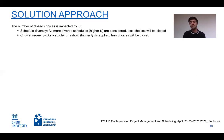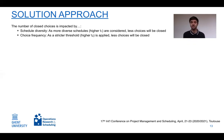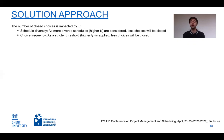The number of closed choices is impacted by both criteria. As we consider more diverse schedules — i.e., a larger subset — the probability of closing a choice decreases because more different alternatives appear. Similarly, as we use a stricter threshold T2 to label alternatives as preferred, the lower the probability that any alternative can be closed.